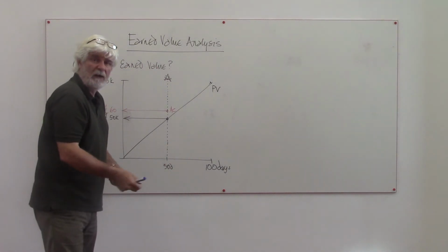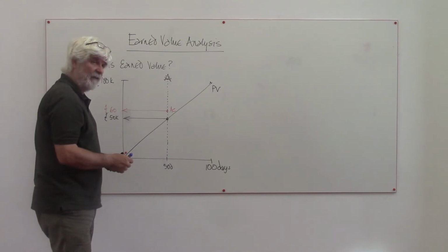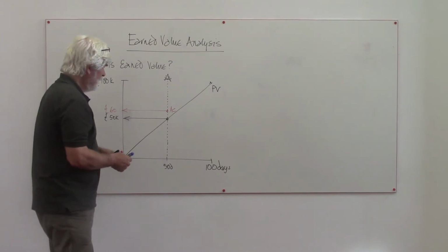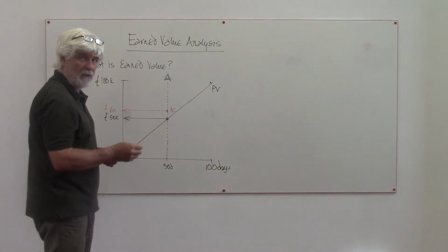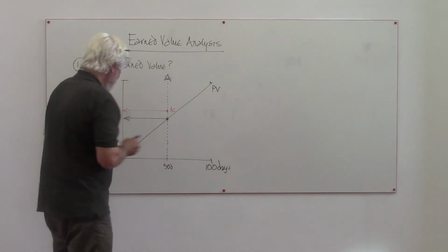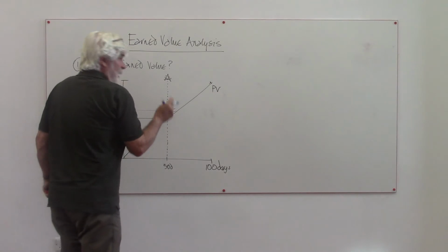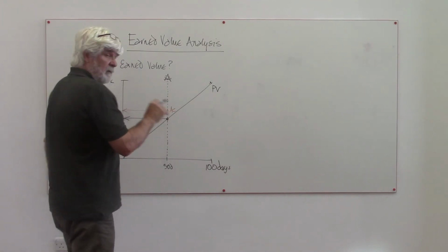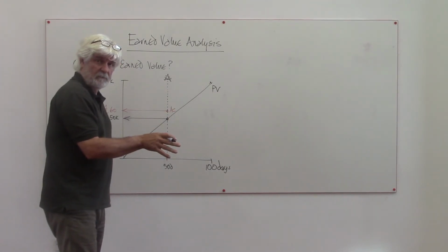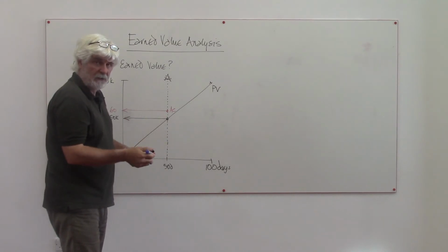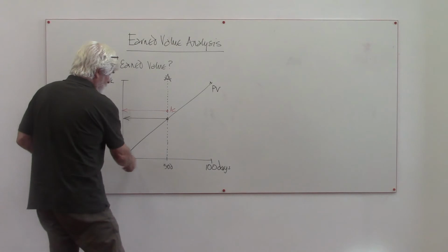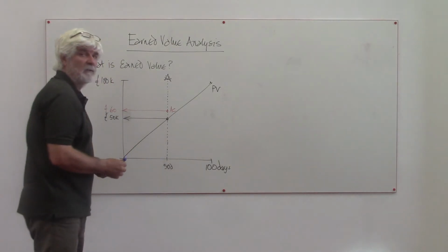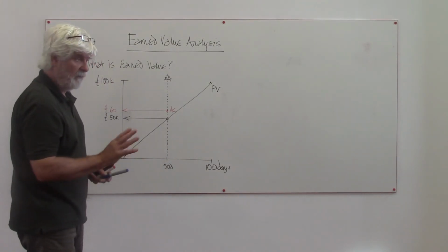So let's assume we go out there, these things have been being produced. Let's say we go out to the workshop or wherever they're being made, we have a look and we've got 4 done. And these 4 are in lovely condition. Quality's not an issue, but we've done 4. You would be able to surmise from this that we should have done 5. We've done 4.